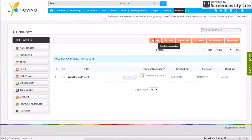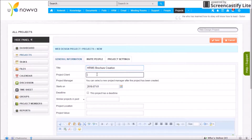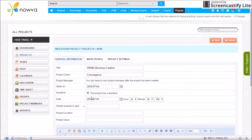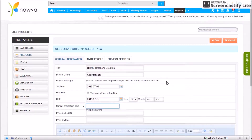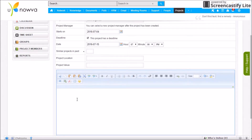To add a new project, click New. In the General Information tab, enter the title, the start date, whether it has a deadline and the deadline date and time. You can also search for similar past projects, enter a project location where the project will take place, and add a project description.